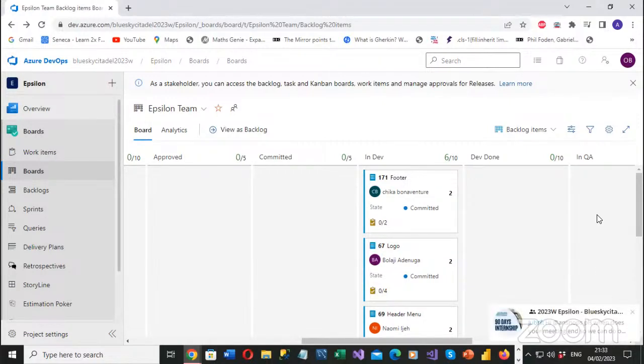Do you understand? So you, QA, you are not allowed to move any story from committed and drop it into QA. It doesn't work like that. It needs to go through the process, and that is why the board is there. It is very simple. You can see the layout is just clear. That's the layout. Okay, so once the developer has placed the ticket in dev, you can see that in your QA column there's nothing there. It doesn't mean you're not doing anything.